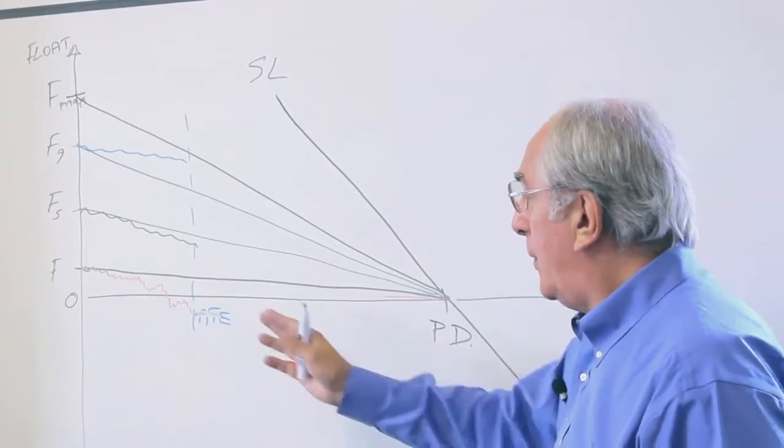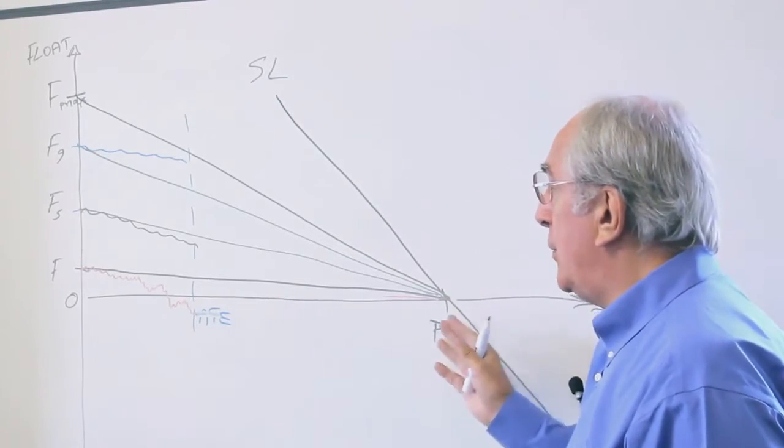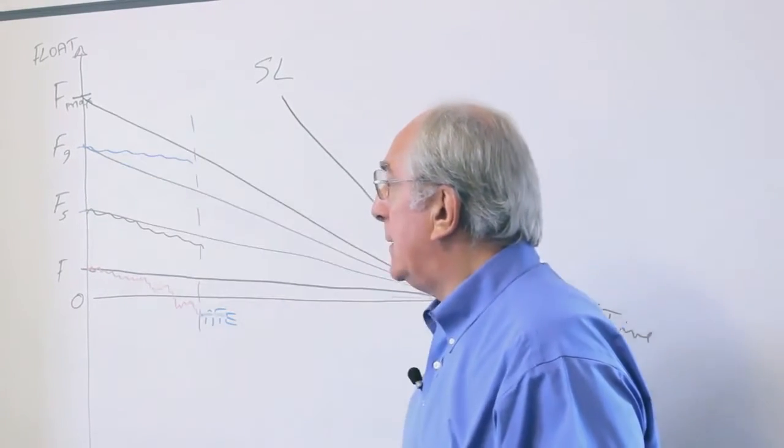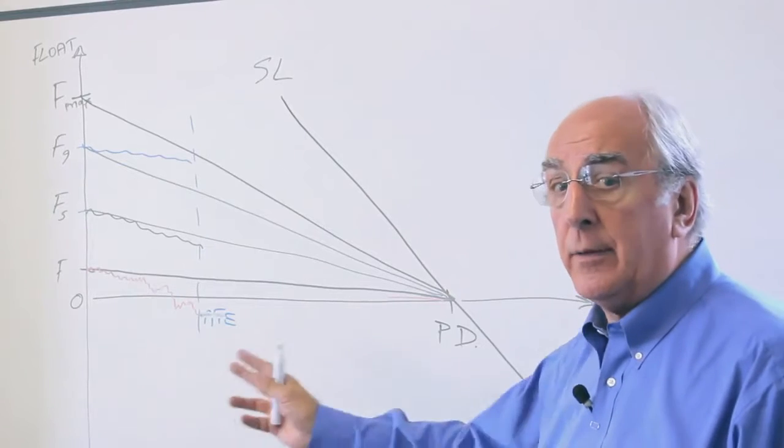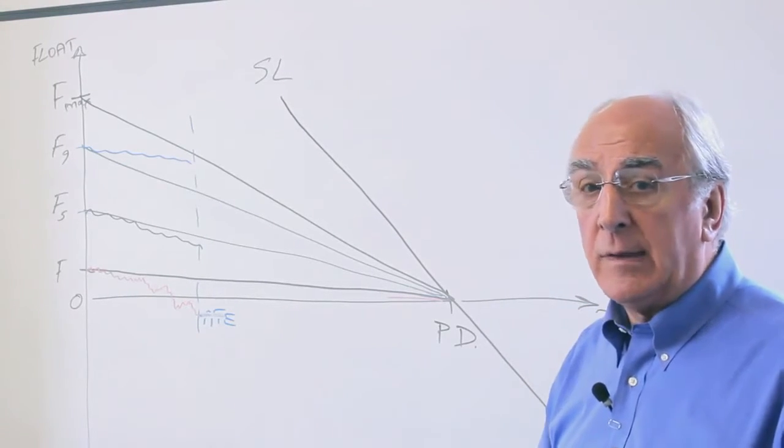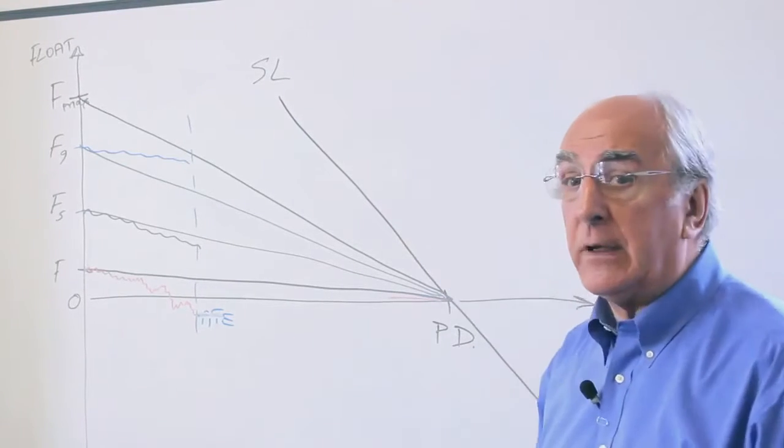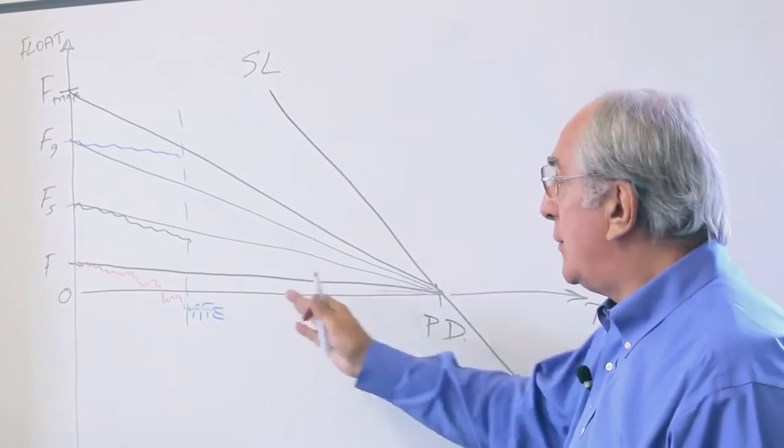In essence, if we have working days along the project duration, therefore working days in the float up there, and the days on this axis are the same scale, this is a 45-degree line. It can change if we modify this to be a calendar date.